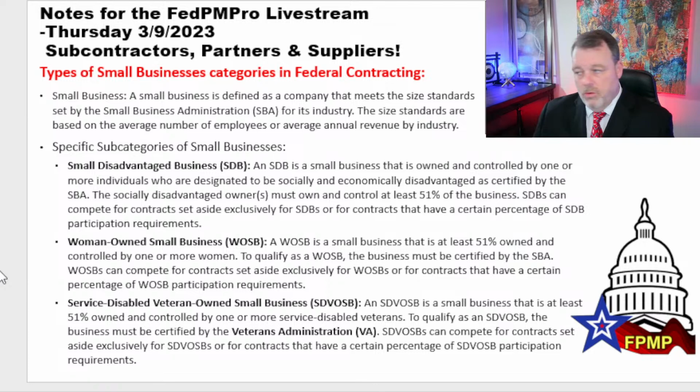So like I mentioned before, you might see 5% SDB, might see 5% WOSB, or a lot of times you might see a group of them where they say it has to be 30% SDB, WOSB, SDVOSB, 8(a), HUBZone. You might get all of them, and at least the makeup of all of those companies needs to equal 30% of the program cost or something like that. So again, it can be all over the place. There's all kinds of variation on this, but you need to know which ones of these these are.